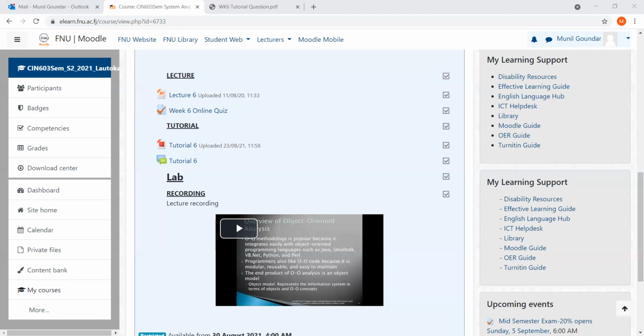Now this is how it actually looks, okay? So based on this, you actually go and determine what your start date is, what your finish date is, and how things will be aligned. Moreover, if you notice this, you'll see that these two activities run together. The predecessor is formulate idea. For choose designer, the predecessors are these two since they are in line. For logical design, the predecessor is choose designer. For checking the design, the predecessor is logical design, and so forth. So this is on the Gantt chart.